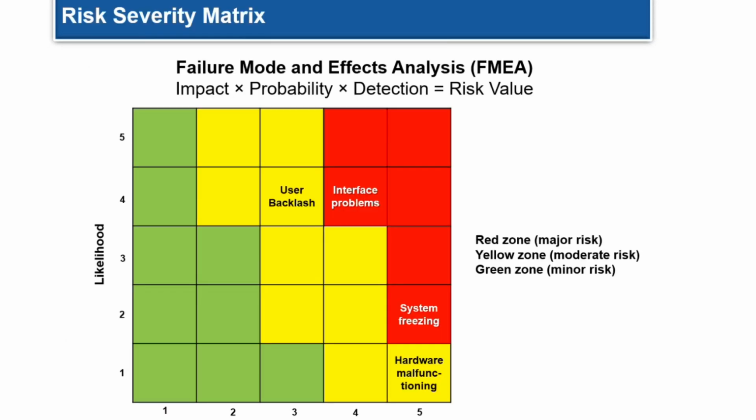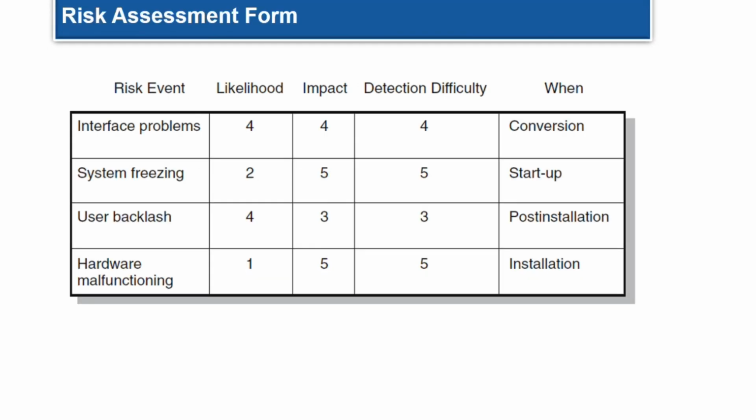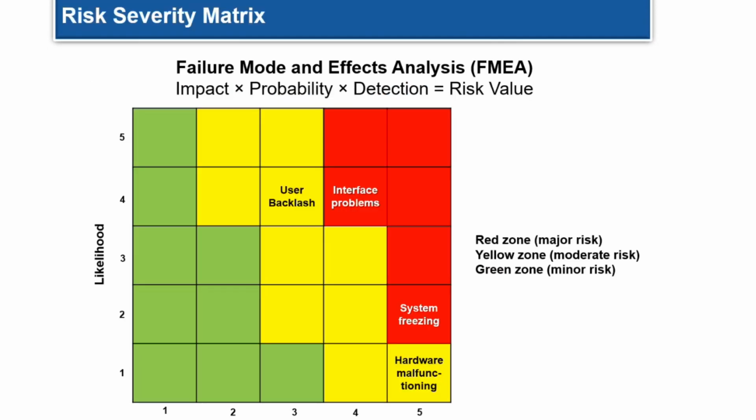Okay. So the risk severity matrix, as I mentioned, you can do like a responsibility matrix or risk assessment matrix or cost evaluation related. So this matrix is about risk severity. When it comes to the red part, it means very risky. And yellow is okay, and green is moderate. So using this tool can be useful, very visual in analyzing different risk severity. You can find this quite useful in categorizing these different severities, and also on each dimension. One dimension is the likelihood of the event happening, and on the other dimension, the vertical one or horizontal one, would be the impact. So one is likelihood, one is impact. If you get this table and you get all the numbers ranked, then you can get this matrix. Okay. Next one.